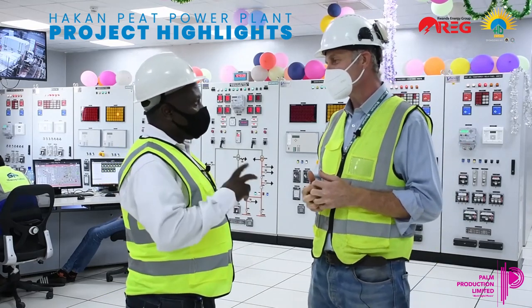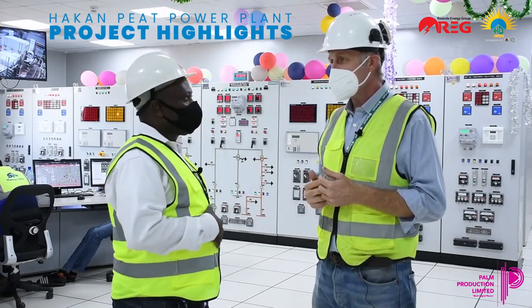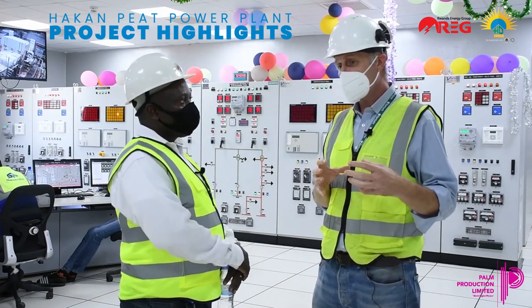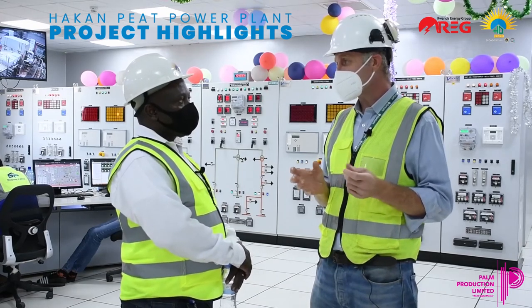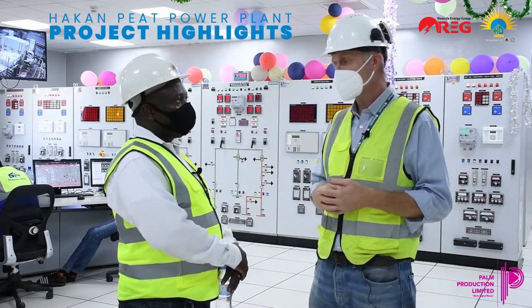So what are the timelines? When are we getting our hands off the project? So commissioning is happening now. Unit one is ready. Unit two is under commissioning now. Then we'll have 1 month of reliability testing and contracted capacity testing. So literally within 6 weeks, the power plant will be operating and generating revenues. Yes.